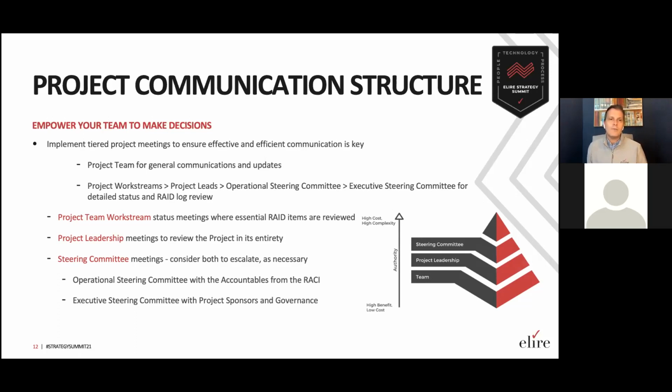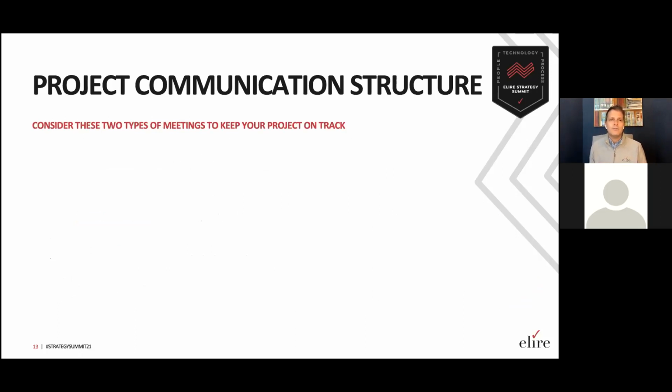One of the earlier topics talked a lot about stakeholder engagement, and this is one of the best ways to accomplish that. And then, of course, the final executive steering committee, which has the ultimate project sponsors and governance for those issues when consensus can't be reached earlier at a lower level, or if it's terribly risky or terribly impactful.